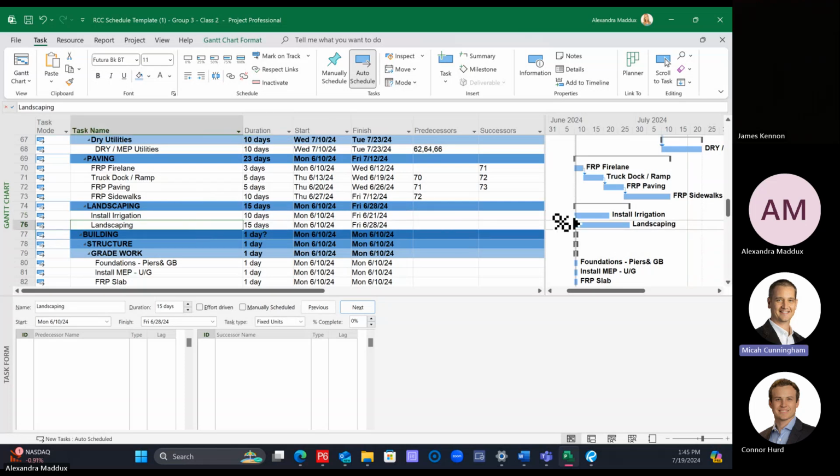Okay. So you can actually click on the whole bar. When you have this cursor right here, I'm hovering over the irrigation bar, and I'm going to click on it with this cursor, and I'm actually going to drag. Do you see how now there's a big link icon? I'm taking this irrigation, which has a little box around it, which is really small, but there's a box. And when I get a box around landscaping, so right now there's no box on landscaping, but if I drag down, then there is. That's another way that you can tie things finish to start.